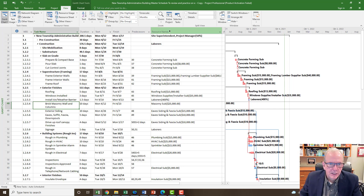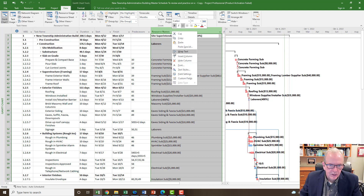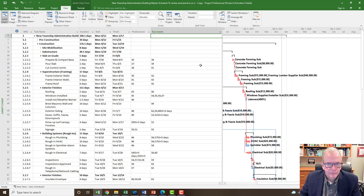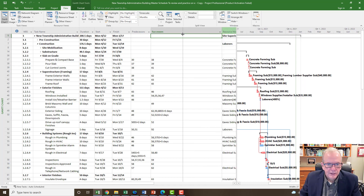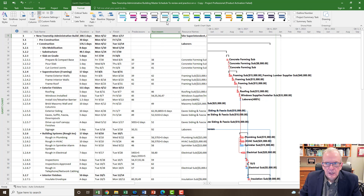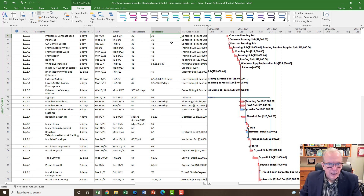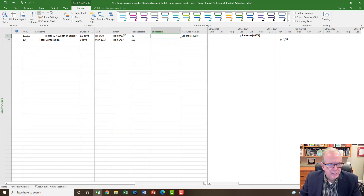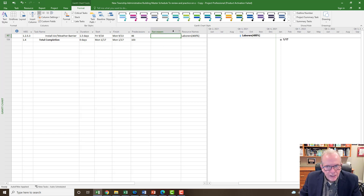I'm going to click on Resource Names, right-click, go to Insert Column, and find the Successor column by typing S, then clicking Successors to insert it. I've got it inserted. I'll pull it a little tighter. Now I'm going to go to Format, click on Summary Tasks to hide them. Then I'll filter the Successor column — select all and show me the blank ones. It ends up showing me two in this case, which is expected. That's recording what is not connected.